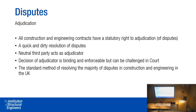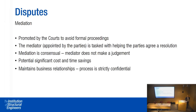Adjudication: all construction and engineering contracts have a statutory right to adjudication — probably 99% of the contracts you are involved in will have this right. It is known as a quick and dirty resolution of dispute, with a very short timetable. A neutral third party is appointed as adjudicator; their decision is binding and enforceable just like a judge's, though it can subsequently be challenged in court if the adjudicator got the wrong decision. It is now the standard method of resolving the majority of construction disputes, and court cases have fallen dramatically since its introduction.